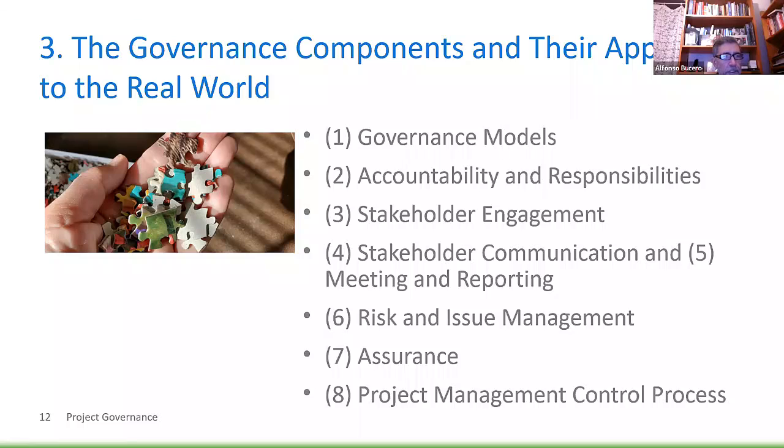So when defining accountability and responsibilities, the project manager needs to define not only who is accountable, but also who is responsible, consulted and informed for each of the project's deliverables.